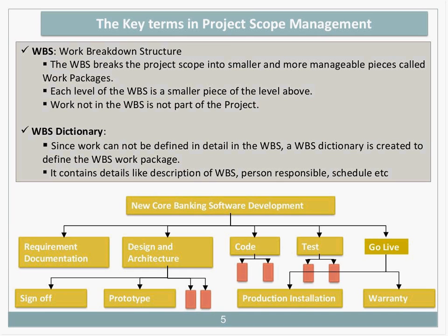Not all levels of the WBS can be broken down further than others. Some deliverables only have to be decomposed to a certain level, while for others various levels are required to reach the work package level. The work package is the level where the cost and schedule of the work can reliably be estimated and the work can be monitored and controlled. The number of levels that the scope is decomposed to will depend on the complexity of the work, the scale of the resources, as well as the management style of the project manager.